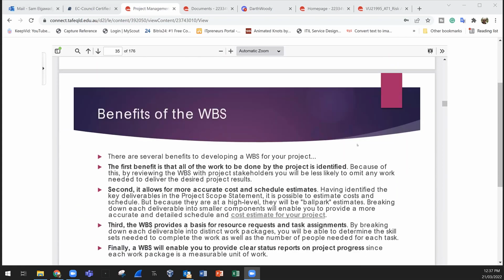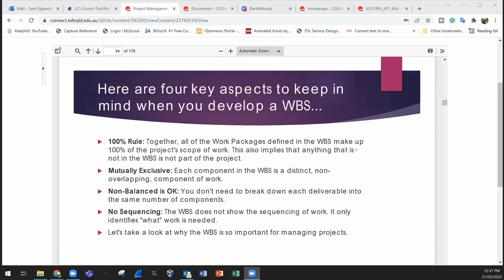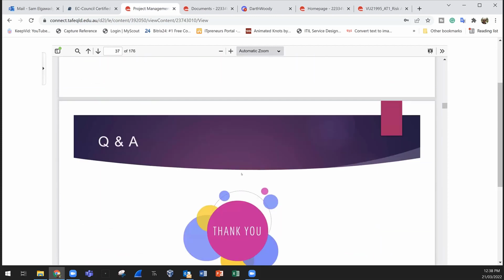So why do we need that? We have a big problem. Instead of managing this big problem, I will decompose it into smaller parts, as we see in this diagram. These smaller parts can be managed easily. Here I have the project assigned to the project manager and her team. Then under that, they are assigning the walls to person X, the floors to person Y, and then to different teams. So here I can manage the work in a hierarchy and in smaller tasks, so it can be easily managed, monitored, improved, taking corrective actions, and so forth. So we need to have this WBS.